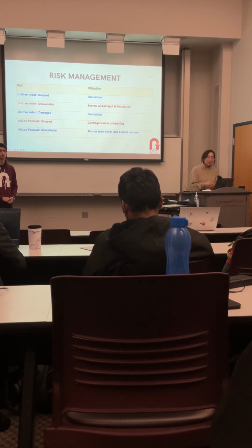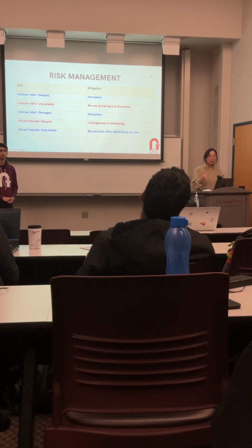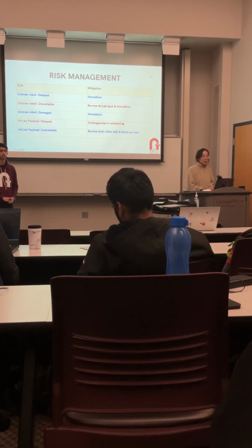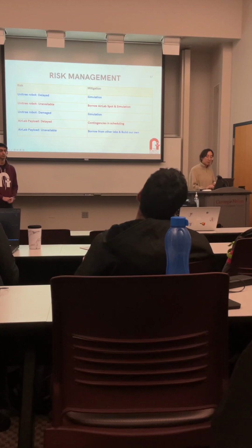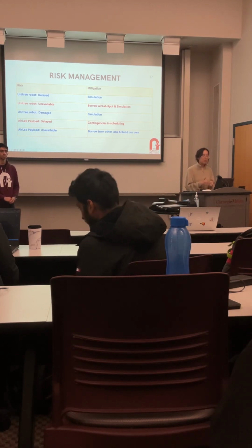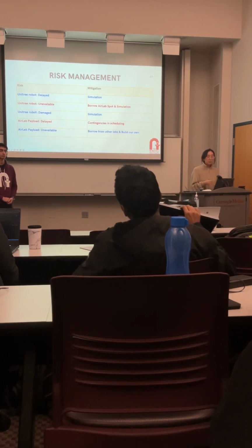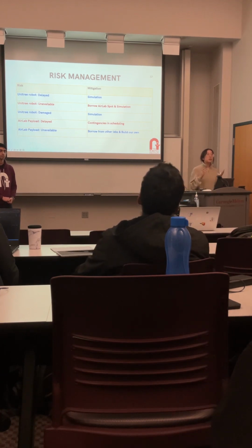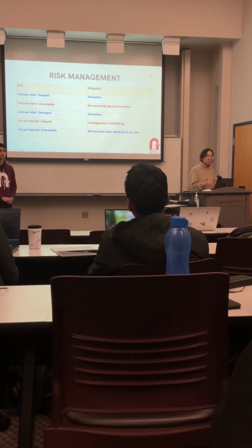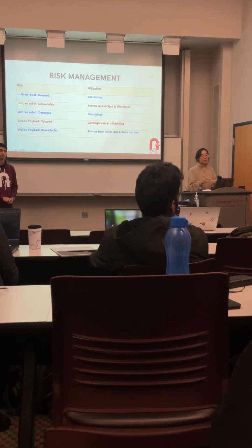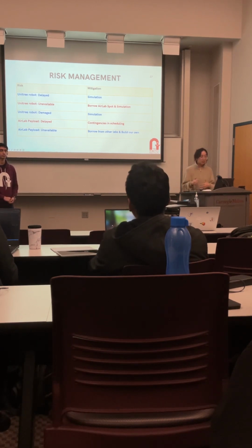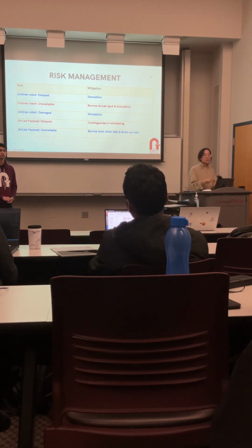The consequence is that Spot is super expensive and super popular for researchers, so we couldn't have our own robot to play with. We will work out a scheduling agreement for Spot in the AirLab, and we will do major development work in simulation using a Gazebo model of Spot robot. Third, if the Unitree robot gets damaged somehow when there's an important demonstration approaching, we will demonstrate our project in simulation. We will also work with Unitree tech support to fix the robot. In the worst case, we will leverage the 1-year warranty and request another robot to be shipped to us.